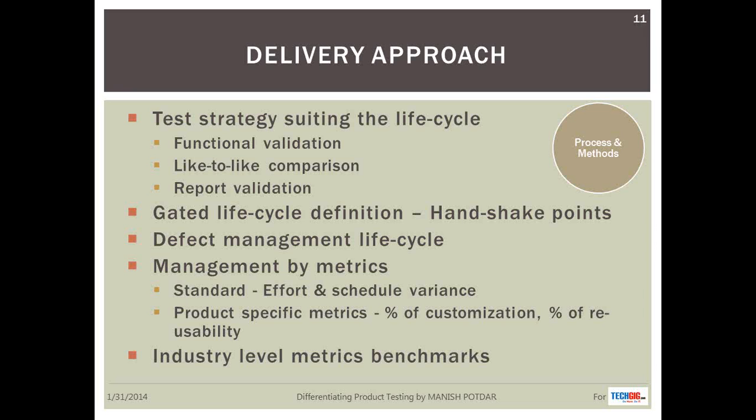So the whole defect management life cycle also needs to be managed very critically. Probably a tool-based approach would be the best way to go. But at the same time, forming triage forums, involving the product vendor on the forum, along with the buy-in from your customers, is equally a good strategy to manage defects and turn around faster, with better and good quality.